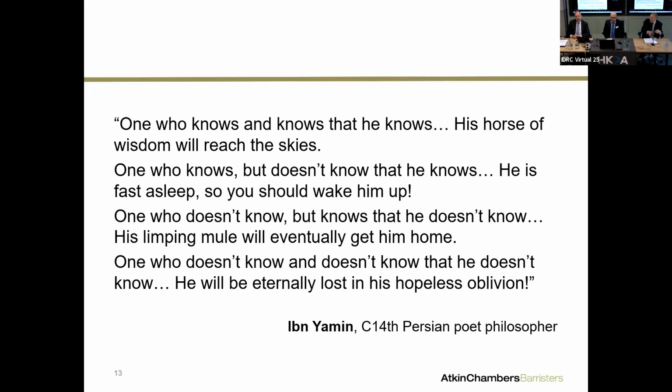So I think, yeah, no, fair enough. I think the recent ones I've seen are what I call a bit of a hybrid. Quite often there is design and build or EPC underlying it, but the employer is bolting on contractors around it, so civils or groundwork contractors, and that creates an interface between EPC and your directly employed contractor. So in that sense, it's not pure EPC. The idea is you just push the whole risk of the whole thing from beginning to end on the contractor.